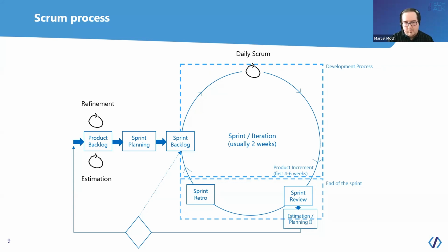And with such a rapid process of 2 weeks, usually the first usable product or MVP, in a very small sense, where the customer can actually see something like a UI or the first things we've agreed on, is ready in 4 to 6 weeks. So we can very rapidly create a benefit, or at least something that the customer can test and give feedback on.